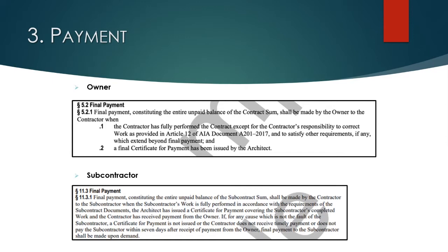How much is going to be held at 50% completion, 75% completion, and along the lines all the way up to substantial completion? Obviously, as a general contractor, to the extent that you can get an owner to agree to 0% retainage, fantastic. Not probably going to happen, but if you don't ask, you don't get. But there ought to be some reduction in retainage during the course of the project, whether it starts at 10 and goes to 5 and ultimately becomes 0 at some point. You should give strong consideration to negotiating that retainage reduction during the course of the project.